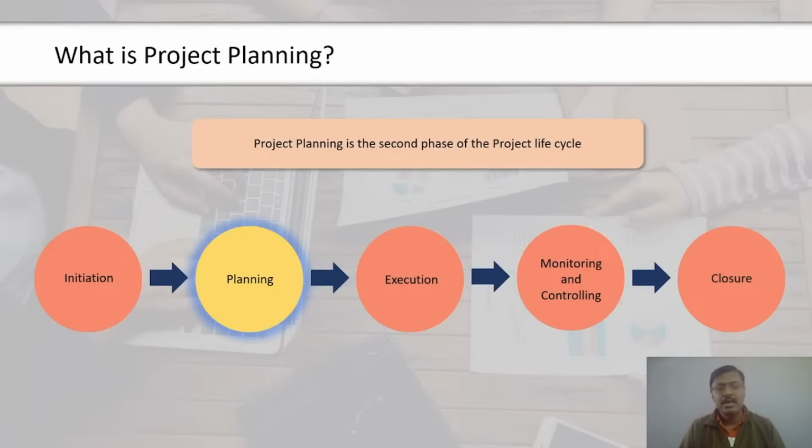Now the work breakdown structure technique, we call it decomposition. We do it top down, as shown in the picture here. Once you have this top down breakdown structure, which we call a product breakdown structure, then I'll go bottom up. What will I do? I will take the bottommost item, for example, the mirror glass.